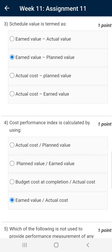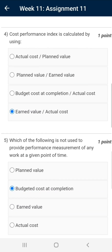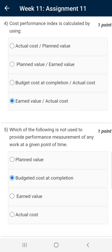Question number three: schedule variance is termed as earned value minus planned value. Earned value refers to the value of a project which has been completed or achieved, while planned value is for the project yet to be completed. Cost performance index is calculated using earned value divided by actual cost. This is the correct answer.